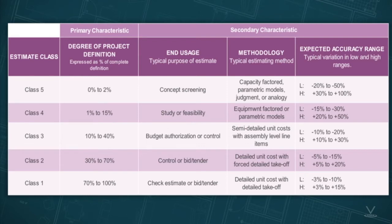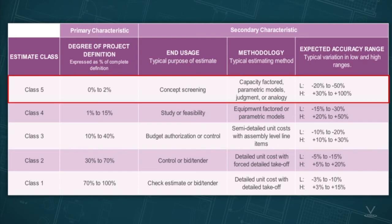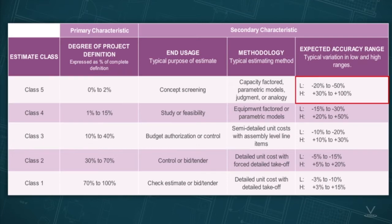Let's go over an example of how you would read the matrix. Let's say you have very little knowledge about a project — maybe you have a general idea of the size, but that's about it. Your knowledge would fall within a Class 5 in the matrix. You can prepare a rough order of magnitude estimate, and it would be appropriate if your estimate fell within 50% lower or 100% higher than expected.